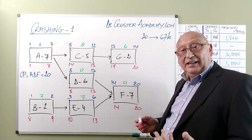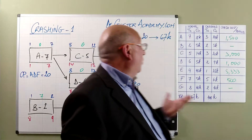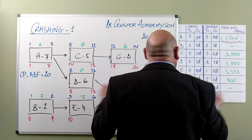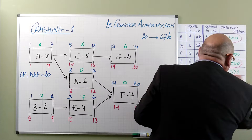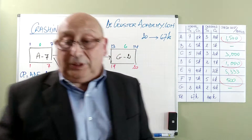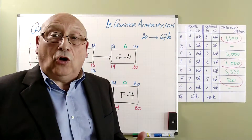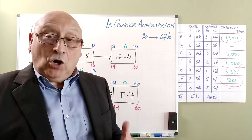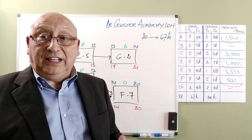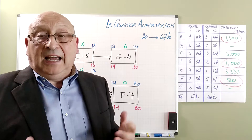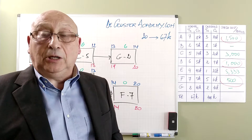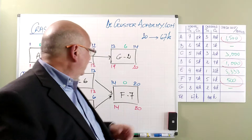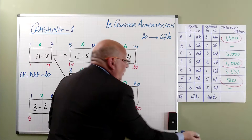We need to indicate the critical activities: A, D, and F are all critical. Since we want to find an economic overview, we start with the cheapest activity and crash that first. We will do this until we reach the minimum duration of the project, and then we will find the relationship between duration and cost.